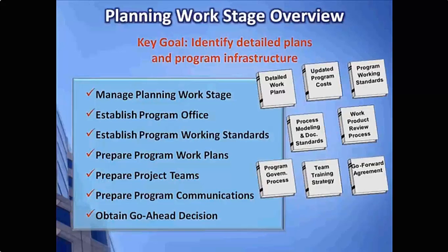We're establishing program working standards, and by working standards, this is really just setting standards for how the project teams will each work and operate. So for example, if they need to produce a work plan, what's the structure of that work plan and what tool might they use to produce that work plan with? How do they report project progress, for example?